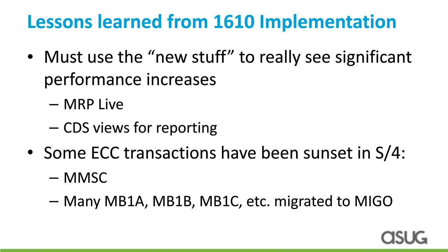That way, we wouldn't be in a rush to do an upgrade at Delta Faucet. So that's definitely one lesson I want to impart to the folks on the phone, to consider in your project. The other contributing factor for that decision was that we were noticing a lot of the third-party software vendors were not certifying for 1511, and they were certifying for 1610. So that kind of drove us to 1610 as well, to make sure that we had certified interfaces.